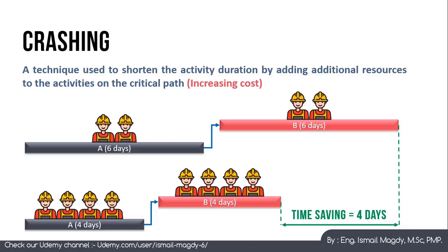First point, this technique must be applied only to activities on the critical path, because it is useless to waste the resources to do it to activities that already have float, because shortening their duration will not change the overall duration of the project anyway.